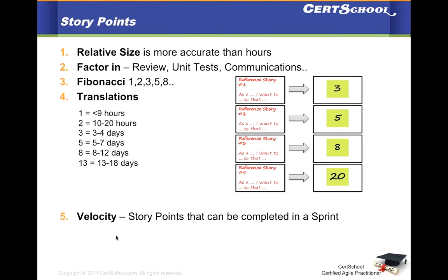Anything more than 35 story points, we will not be able to commit to this iteration. And of course, sometimes you have to factor in vacation time and time off, and if there are new members in the team, so velocity can also be a complex dimension, where you would do a forecast based on all the variables that are there.